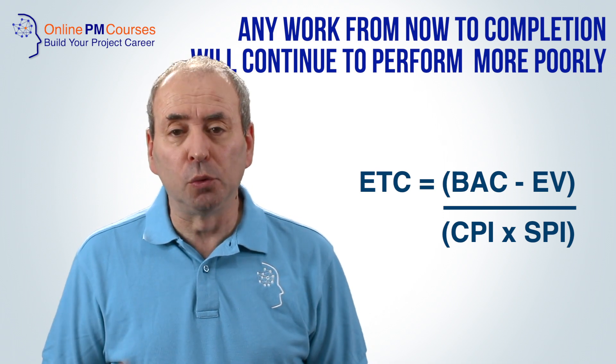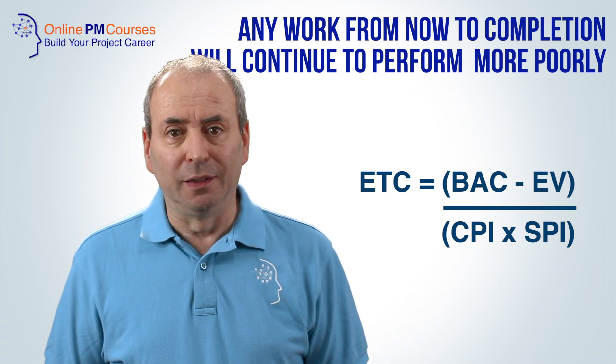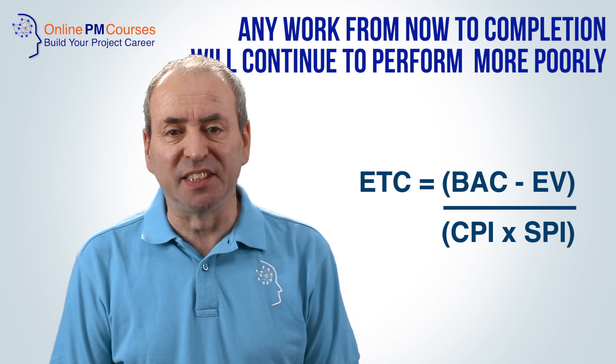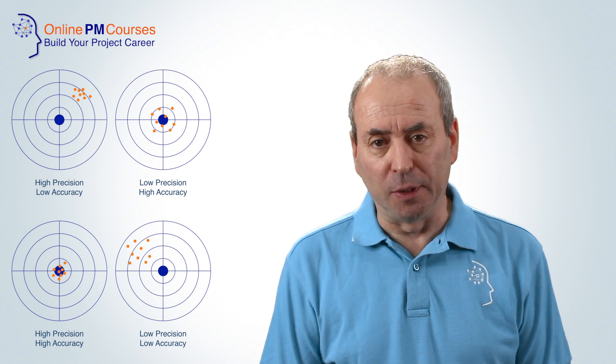This represents the sort of estimate you would make if you think your performance will continue to deteriorate. But remember, the precision of an approach that uses a formula and a set of easy-to-calculate numbers belies the fact that this Estimate to Complete may be no more accurate than any other estimate.